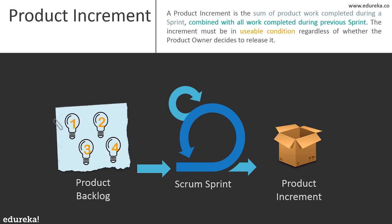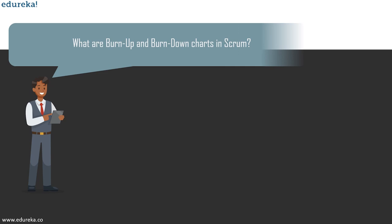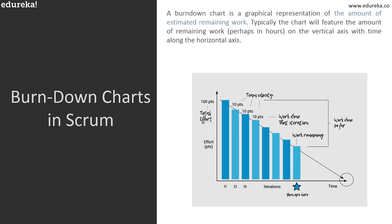Apart from the three main artifacts, Scrum also uses burn down charts and burn up charts to trace project progress. The burn up chart illustrates the amount of work completed, while the burn down chart illustrates the amount of work remaining to complete the project. Efforts are measured in terms of user stories, not in time units like hours or minutes.